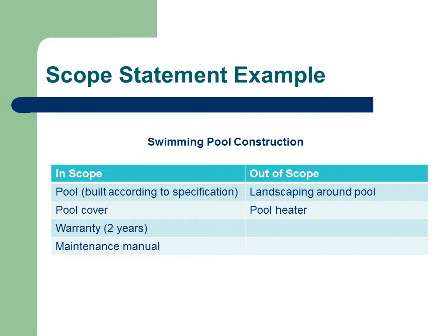Being clear about what is in and out of scope can avoid later conflict with the customer and also additional costs in cases where the customer has a good case for assuming that certain items would be in scope. This is particularly important for a vendor who is delivering a product with a fixed price contract. In this case, the vendor would end up wearing the cost and will possibly make a loss on the project.